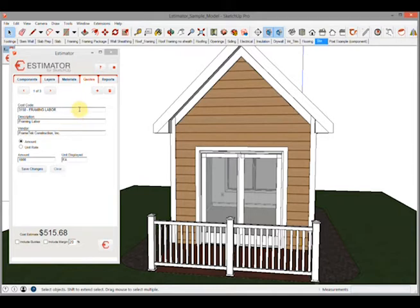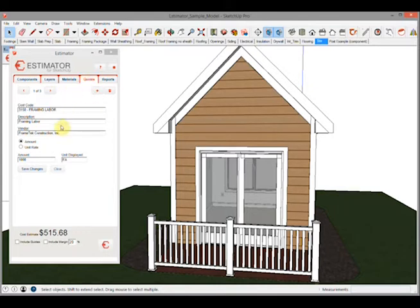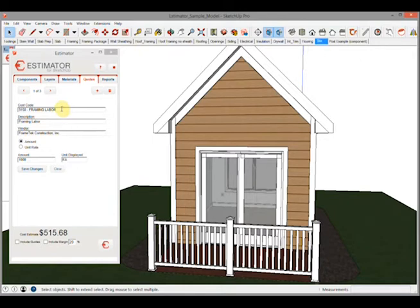When we go to the quotes tab we can add as many quotes as we want. In here I've already got three just to show as an example. But for instance, we may want to put framing labor, something we can't exactly model. So we'll pick the cost code for framing labor, put a description, and choose our vendor.